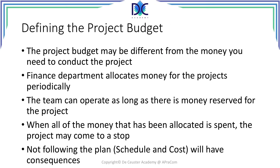What is the project budget? The project budget may be different from the money you need to conduct the project — it contains more elements. It's not just the cost to do the work. Your financial department will allocate money to projects on a periodical basis. Every period, typically one month or three months depending on the cost control that the company is using, you will get a reserved amount of money to do the work.